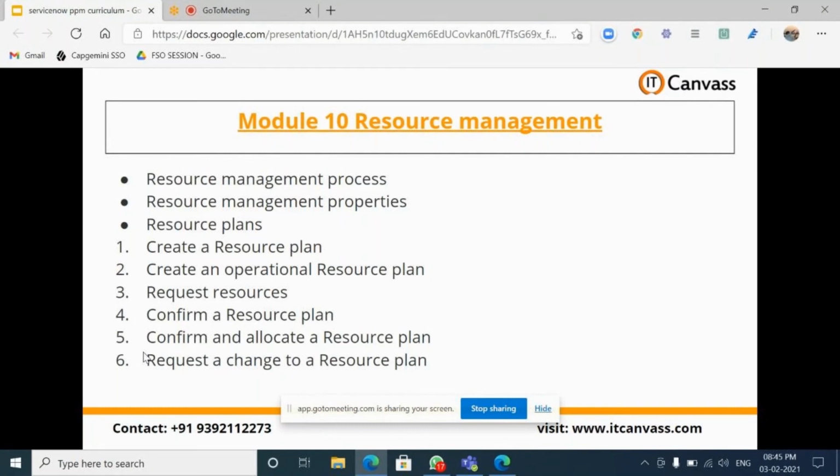So in this resource management, a price tag will be assigned to each developer. If it is a junior developer, for example, $10, a senior developer $15. So based upon the employee capability, the resource manager will allocate the prices for the execution in the project.